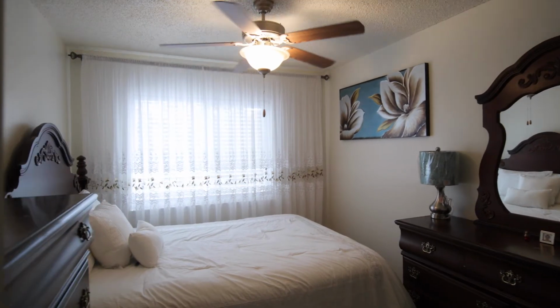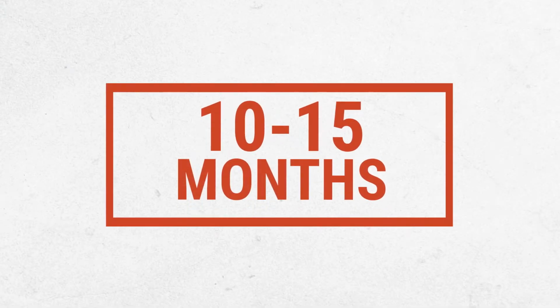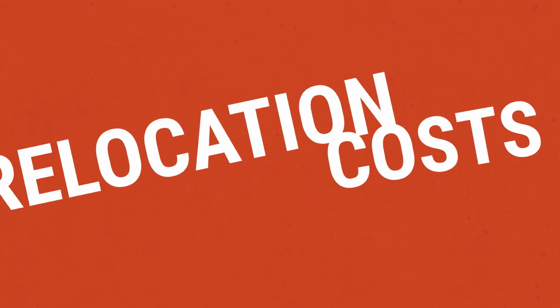The typical traditional method of rehab takes anywhere from 10 to 15 months. As a developer, you're going to have lost rents, you're going to have displaced families, you're going to have relocation costs. From a contractor standpoint, it's just really difficult to schedule the work with trade contractors. They're going to want to complete their work in full, and the trade contractor that follows them can't come on site until their work is 100% ready.